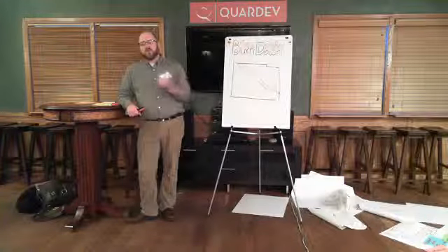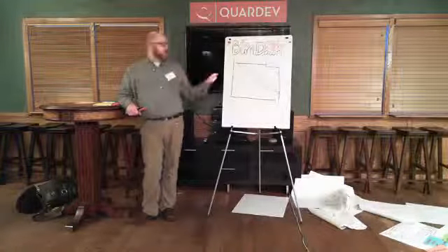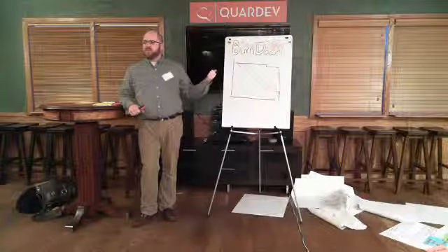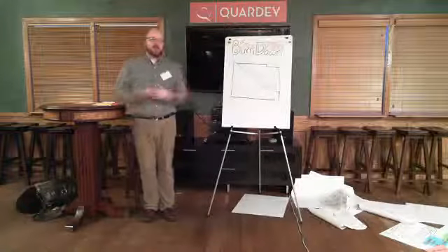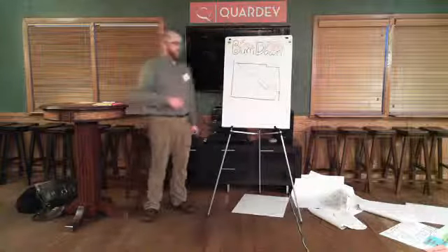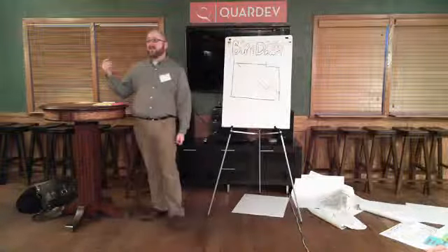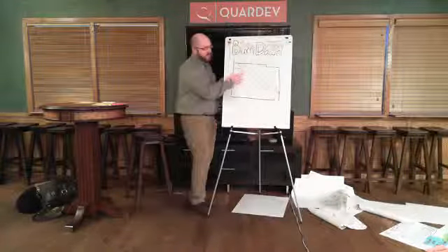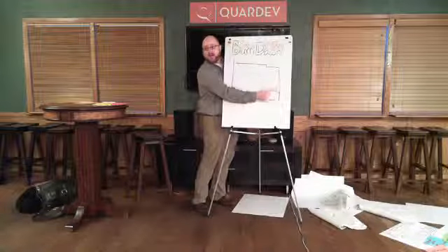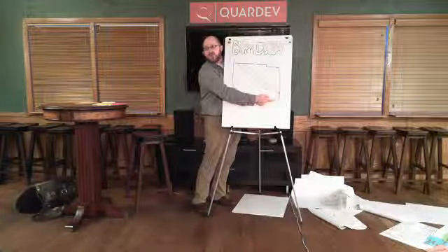Well, the number one thing we want is visibility, right? The burndown doesn't solve any problems. It just shines a big spotlight on it. Yeah. So it makes you talk about it. And so the example you have is, we have a customer bug and it has to get fixed. We didn't know, and it has to go in now. The burndown will tell you whether that's going to push stuff out and about how much it might push out, so that you can respond to that.